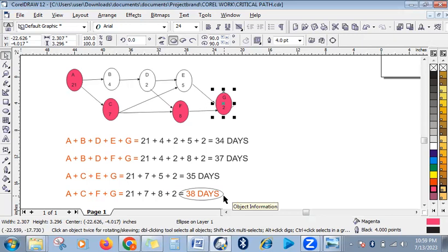So this is how to calculate different activities in a project. When you get to site as a project manager or site supervisor, and you are given a task to supervise the workers on site, all you need to do is get the duration of each activity and put them together to know which one comes first and which follows, the predecessor and successor, and to determine the length of the project, which is the critical path.